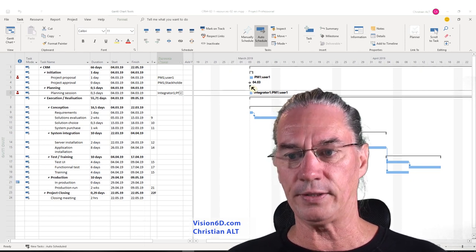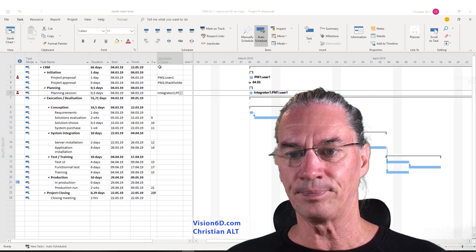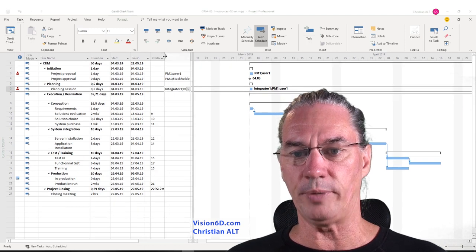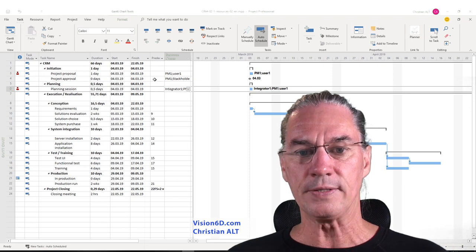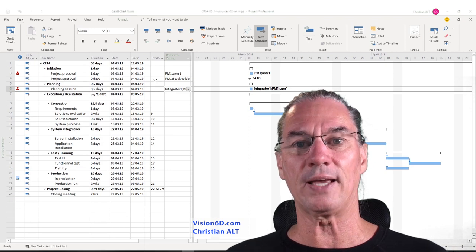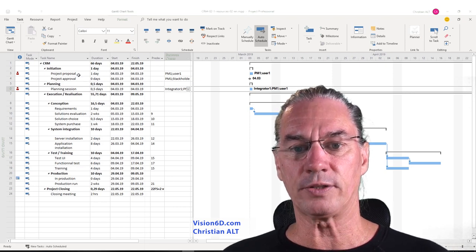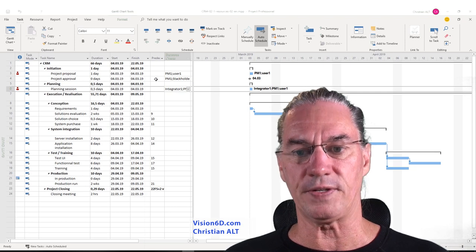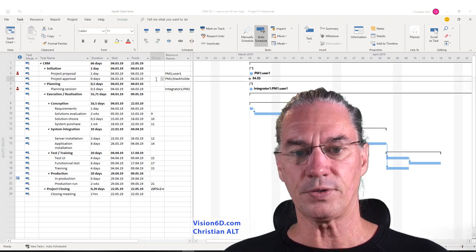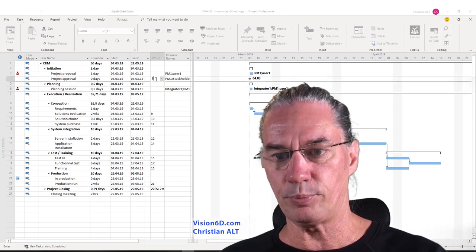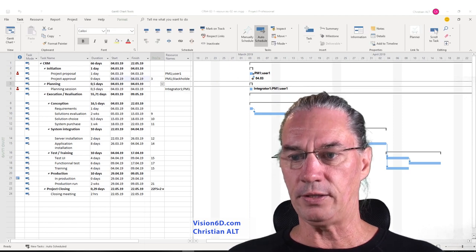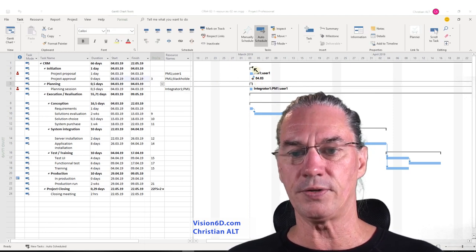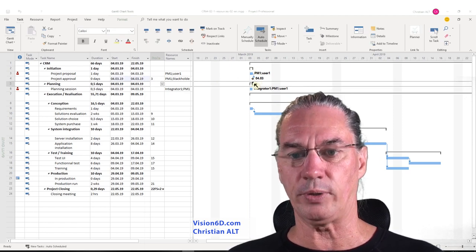To correct that, I'm going to enlarge here a bit. We see that project approval doesn't have any predecessor, so we are going to say that the project proposal is the predecessor. I give the number of the predecessor, which is number three. And you see here we already have a certain sequence that came in.